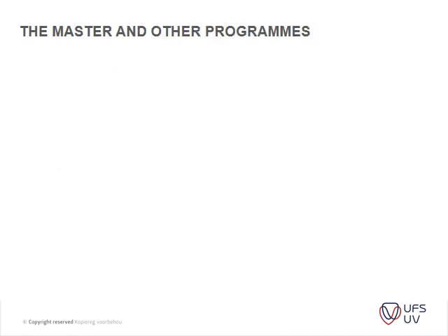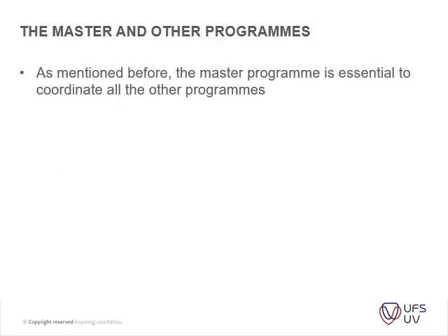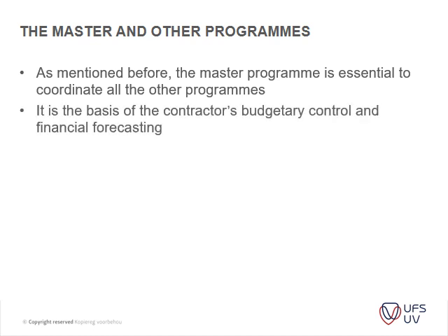And then the master and other programs. In this next section, we're just going to look at what each program is. As mentioned before, the master program is essential to coordinate all the other programs. All the other programs are based on the master program. It is the basis of the contractor's budget control and financial forecast.